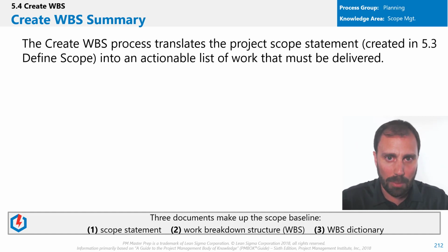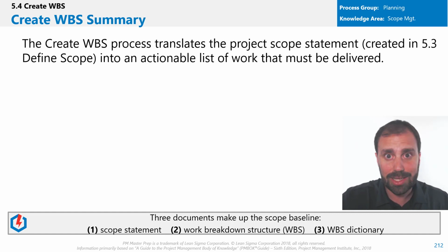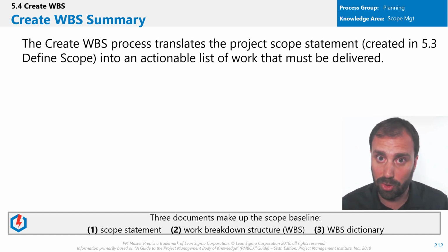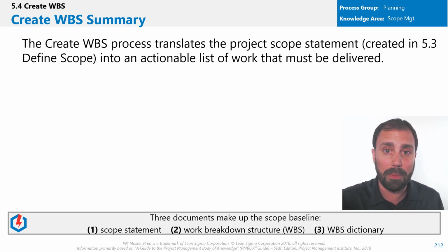All right, so we've come a long way. We had a rough list of a ton of requirements and we refined those down, and we're all the way down in our previous process to developing a scope statement. That's the highly refined, very objective statement of what is inside the project and what is not inside the project as far as scope goes. All right, and so we're almost there. Our goal in this process is to get to a scope baseline.